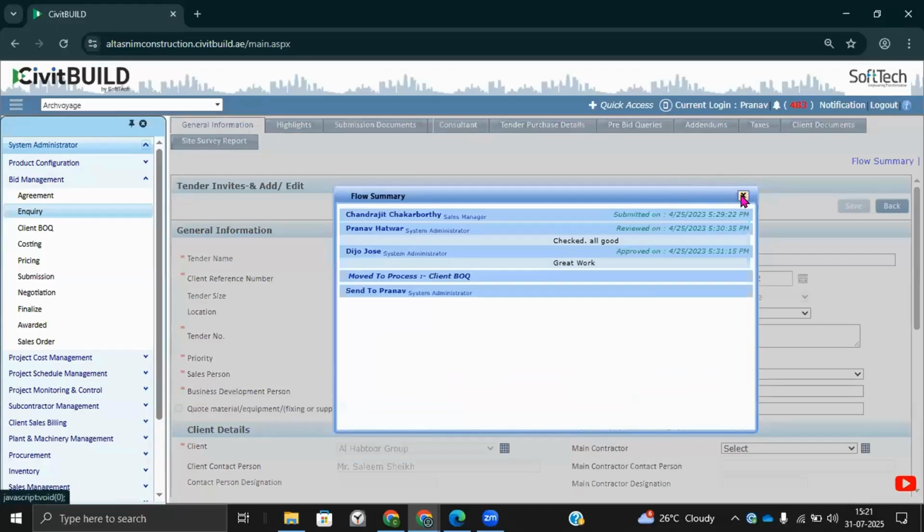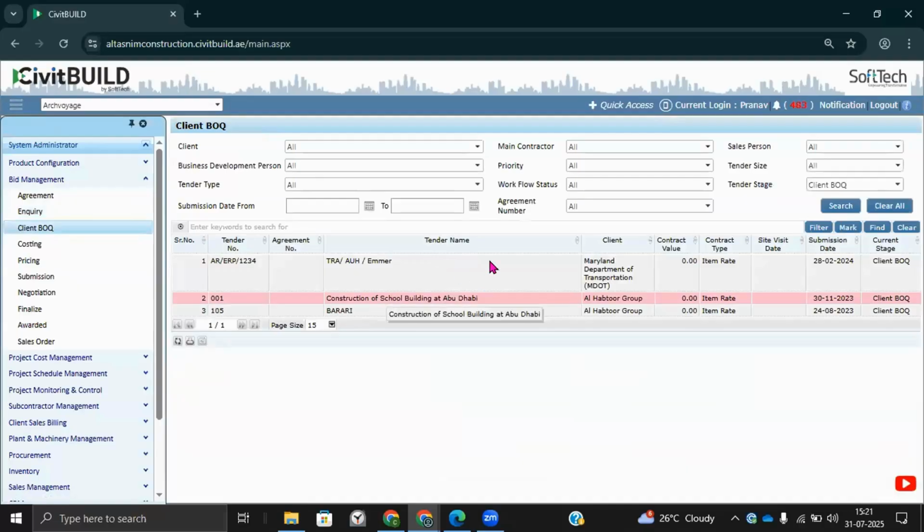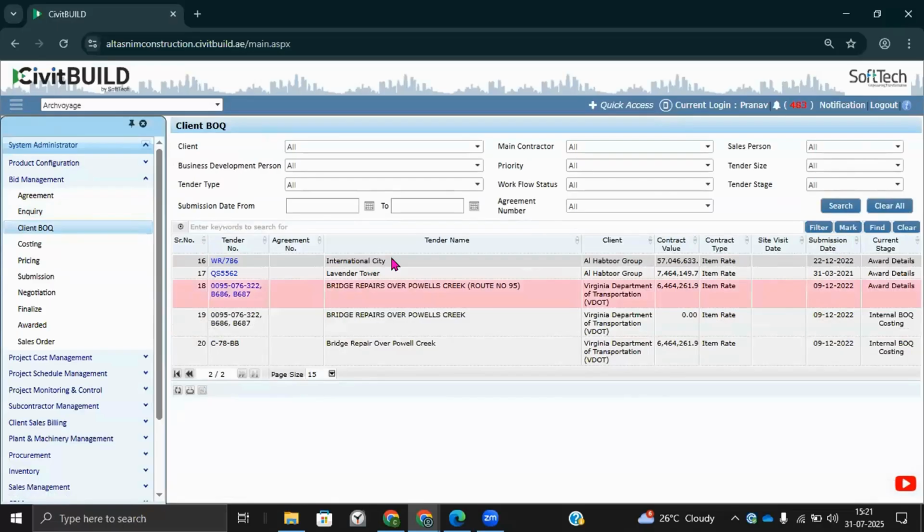After capturing all of those details, it is forwarded to, for example, the tender department head, who is supposed to decide whether to go for this inquiry or not. When an inquiry floats into the market, it may come with a BOQ provided by default by the client along with the project, or we may sometimes be asked to prepare our own BOQ based on the BIM model submitted by the client along with the tender document.